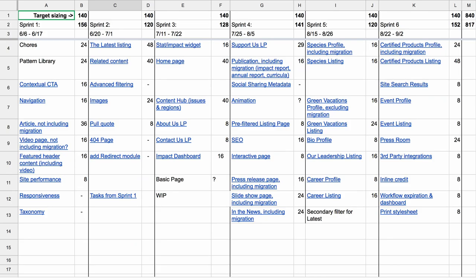You know, that's another interesting thing. That was an epic, the migration of content from the old site to the new site. For each type of content that they had in the old site going into the new site, we had an epic about, well, we may need to migrate this. And those things got pushed back because they thought, well, worst case scenario, we have a team of people, we can do this by hand. It was 100 pieces of content for some, but all the ones that were like 1,000 pieces of content, we included, because we have to do this programmatically, that's what makes sense.